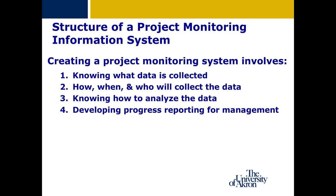There are four core aspects to developing a project monitoring system. These four aspects include: one, knowing what data is to be collected from the project; two, how, when, and who will collect the data; three, knowing how to analyze the data; and four, developing some type of status reports for the project team and management.